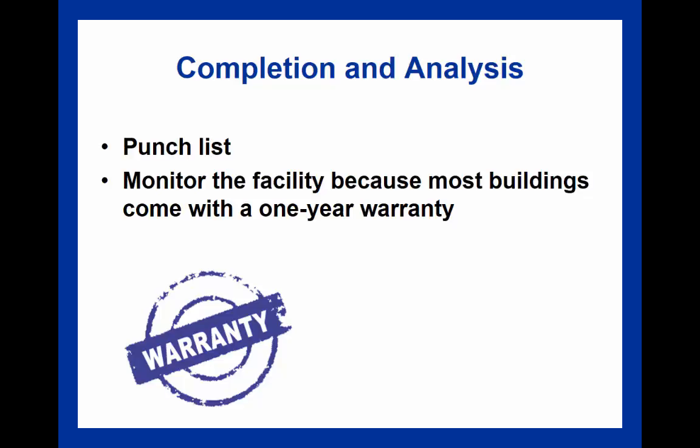Some challenges that might occur when building a facility might be an owner not contracting with an experienced architect that knows about sport facilities, or an engineering firm that can be helpful and knowledgeable in that area. Also, not communicating properly to the designer about what that owner is interested in can also create an issue.